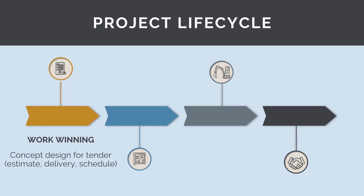In the work-winning phase, for any project delivery model where the design scope is the responsibility of the contractor, the contractor will need to develop a concept tender design. This will need enough detail for the contractor to accurately estimate construction costs, create the schedule, and establish the delivery methodology.